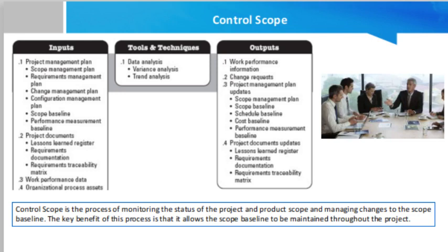Now, what is actually variance analysis? Friends, variance analysis is a method that is used to determine the degree and cause of differences that occur between the project baseline and the actual performance happening during the execution stage. Only when the comparison is made can the project manager analyze the performance of the project.